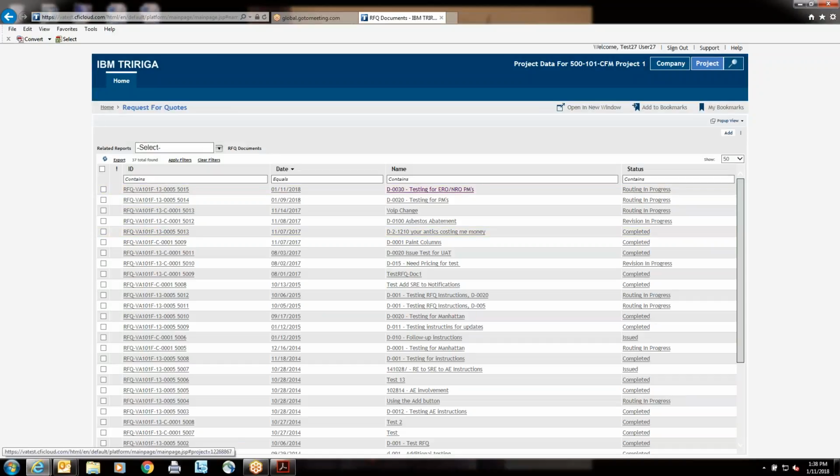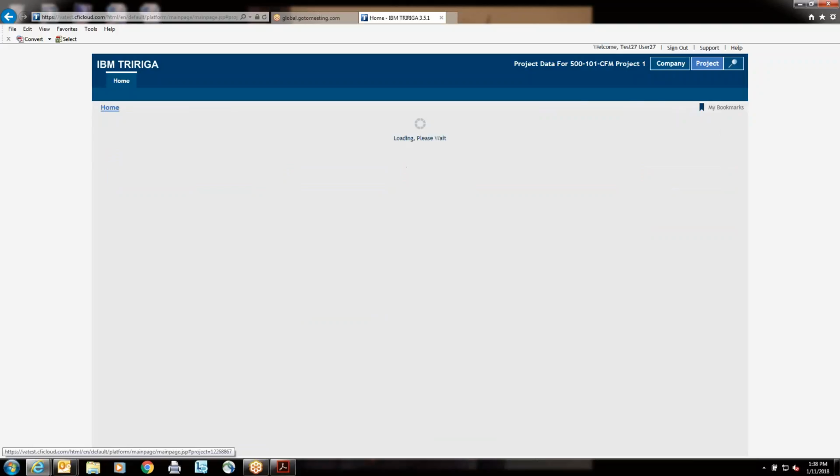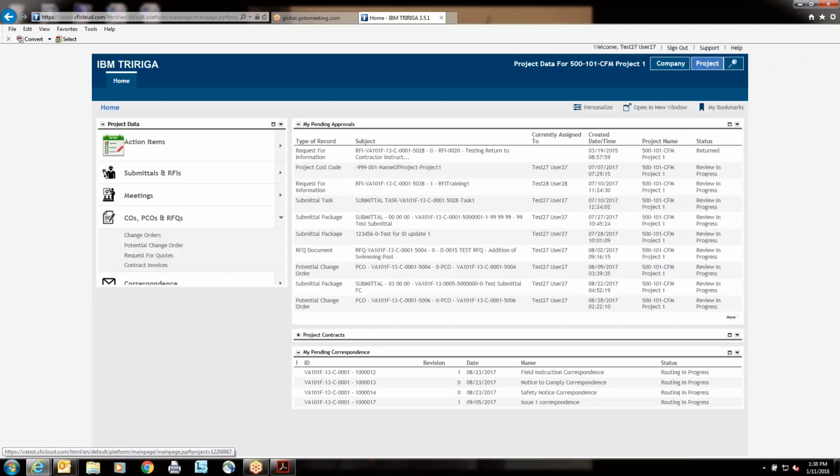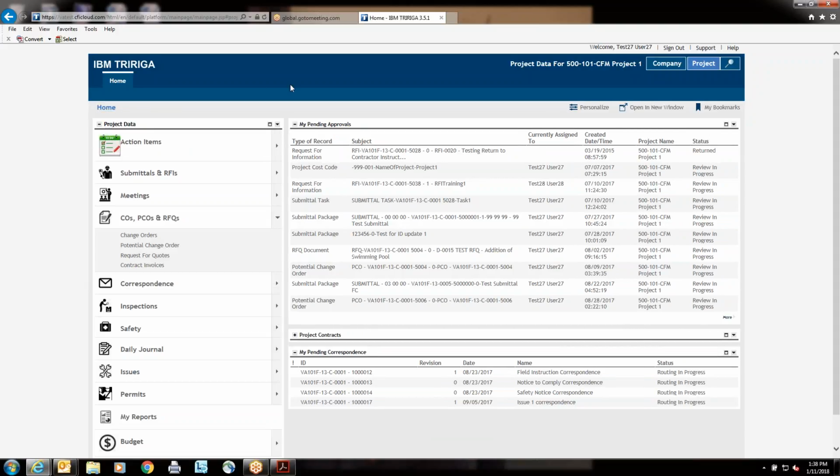Basically, within Tririga, change orders can only be created by CFM staff. Change orders are typically created by an SRE or an RE. There's a big warning up front: you have to enter your change orders as they are awarded in ECMS. Once the change order is input, you have to issue and complete it before you start inputting another change order.